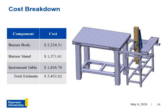The cost breakdown of the project components and machining costs: the burner body will cost approximately $2,200, the burner stand will cost $1,400, and the instrument table will cost around $1,800. The total cost is estimated to be around $5,500. The image on the right shows the burner stand and the table, and how they would be arranged together with the burner stand nested between the instrument table and the side wing.